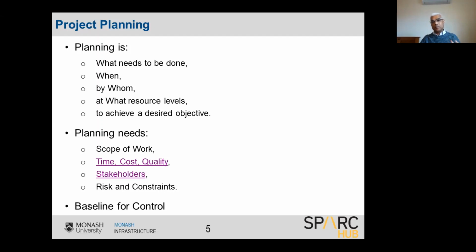So that's the beauty about having a proper plan. Once you get the plan on paper, on the schedule, you use that baseline for the execution and for the control purposes. And as we have discussed last time as well, once you plan, after you commence the execution, it goes obsolete because the plans are dynamic. So you will have the original baseline, and then continuously you will be monitoring, executing and controlling the plan.